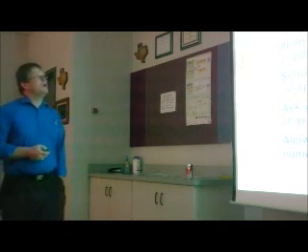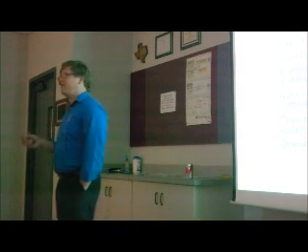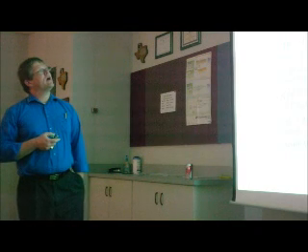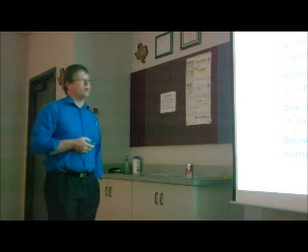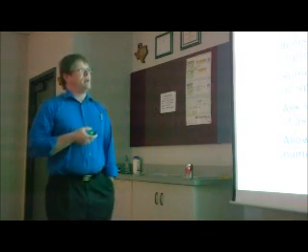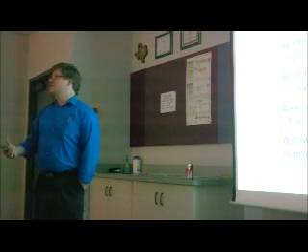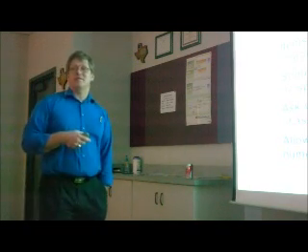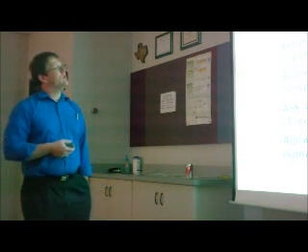Request for proposal. So we've got all this stuff. We've figured out our costs. We've designed our system. We've got everything figured out as far as what we want to a large degree. We think we figured out costs, but now we actually got to go out and make a purchase or find out what the actual costs really are going to be. One of the ways we can do that is we can go to vendors and instead of doing it ourselves, we can go to vendors and say, tell us how much it's going to cost. Give us some insight into any of the designs. Here's our requirements. What do you have in mind? What do you think might work better than what we've come up with?